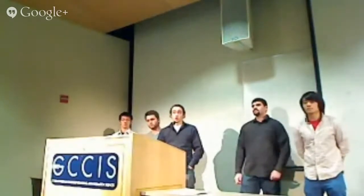We do the daily stand-up every day just to figure out where people are at, if anybody's got any blocking issues, and if they do, how can we remove them. At the end of every week, we'll take some metrics, we'll do a retrospective, look at the sprint, go what went well, what didn't, and how can we make sure that we're working better next week.